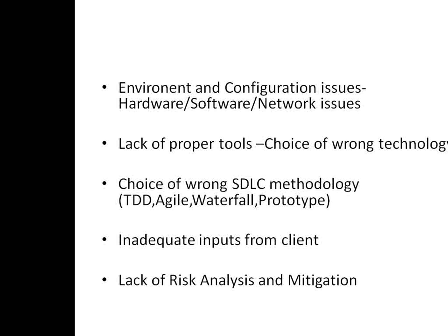So understand the requirement of the client, understand the budget, time, scope, understand the strengths and weaknesses of your company. Okay, keeping everything in mind, then decide. Keeping the market conditions and the current state of technology in mind, decide whether you want test-driven development, TDD, agile, waterfall, semi-agile, semi-waterfall, prototype, what model you want to use.